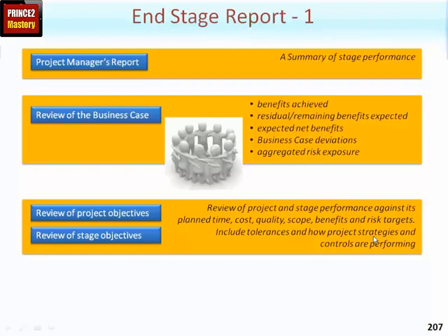And of course the controls that are being applied, the project controls that were developed also and form part of the PID and are embedded in the project plan. Controls like the length of stages, the regularity of checkpoint reports, for example. Another aspect of controls that could be covered here is the amount of information and the amount of detail. Is it sufficient for the project to remain in control?